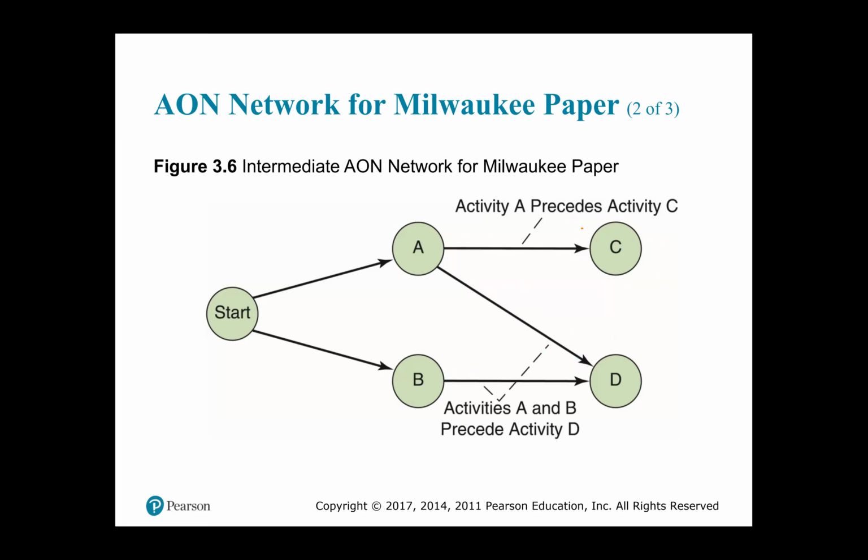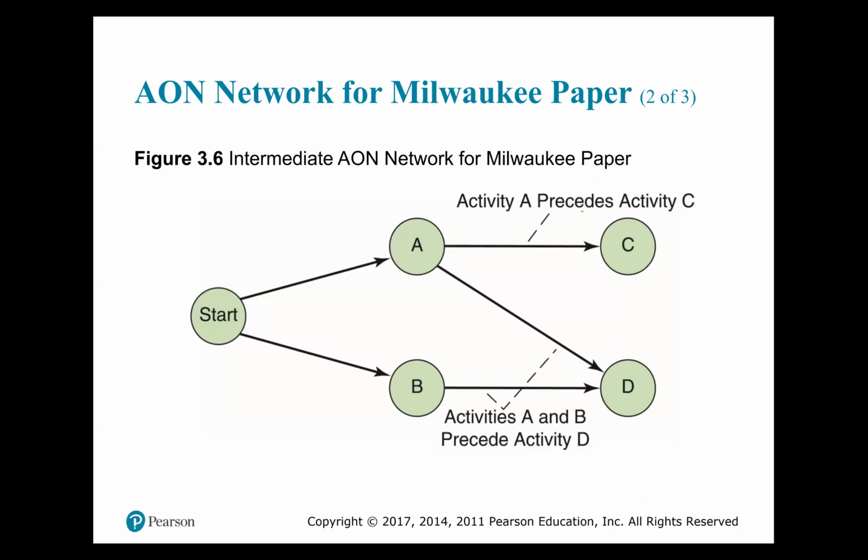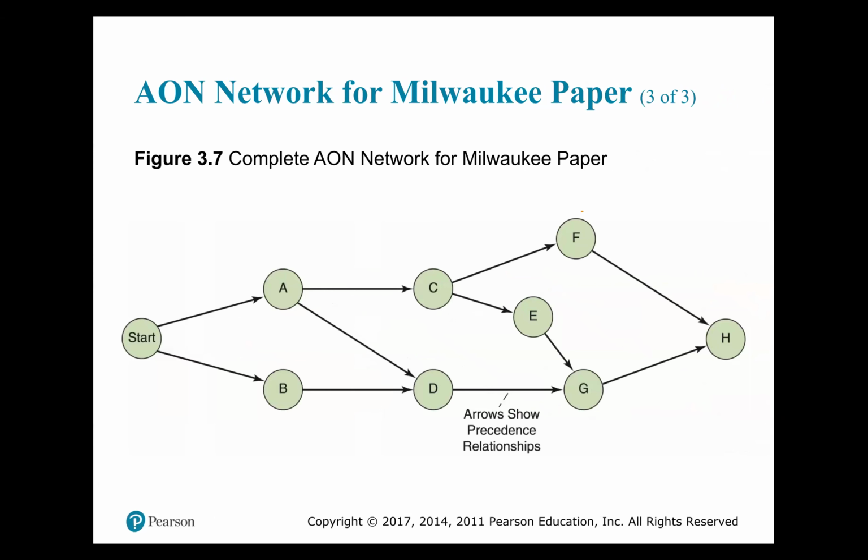So we're going to continue with the drawing of the other activities on the network. Having drawn activity D, when you look at activity E under the immediate predecessor, you will see C. It means that to draw activity E, activity C would have had to be accomplished.